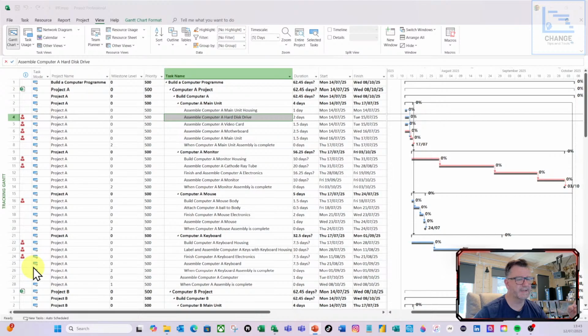So we're over allocated, and remember, I said in the previous live streams, if you've got over allocated resources, it means the dates and that plan, that schedule, is unachievable. You must make sure it's achievable with the resources that you've got, based on the capacity that you've got. So that's key to me.